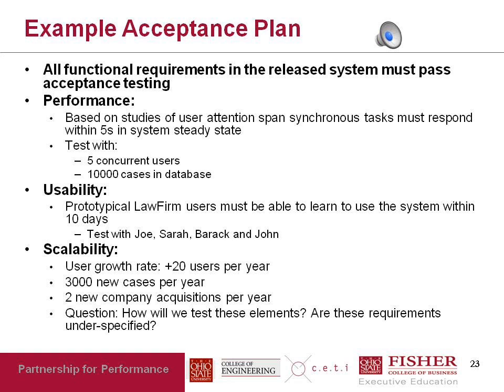things aren't so simple. So for example, let's say that there was a performance requirement that said the system would respond in 5 seconds, okay? And the customer is supposed to test it. Well, does that mean he tests it with nobody else on the system? Does that mean he tests it with 1,000 users concurrently trying to use the system? Does he test it with no cases in the database? Does he test it with 1 million cases in the database?